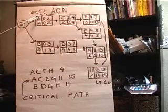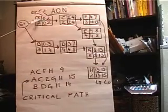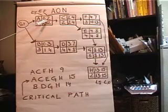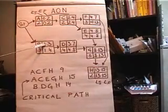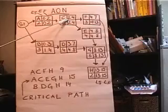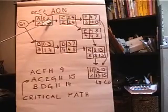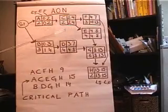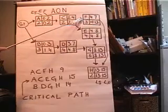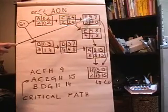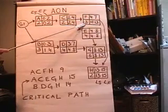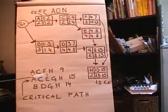So to do the forward pass, what we do is we start A time 0, that's the earliest start, earliest finish is time 2. 0, 3. Then the 2 is the earliest start for activity C because that comes out of A. 2 plus 2 is 4. F comes out of C, so that 4 is now the earliest start, 4 plus the time of that activity, 3, 4 plus 3 is 7, and so on.